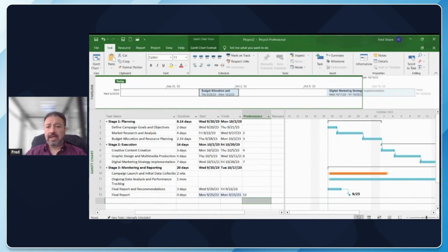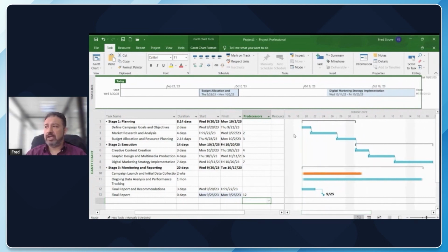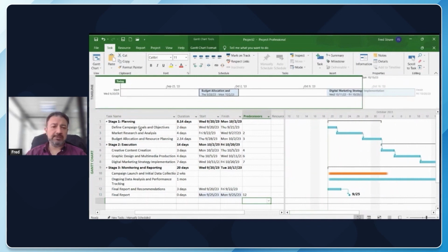One of the things that is probably important for you to know is that here you also have the ability to adjust calendars, and not only a general calendar for team members, but specific calendars per user. By default, this takes the regular calendar where weekends are grayed out. And if I say something takes 6 days, it will take 5 days from 1 week and move the end of the task towards the next working day.